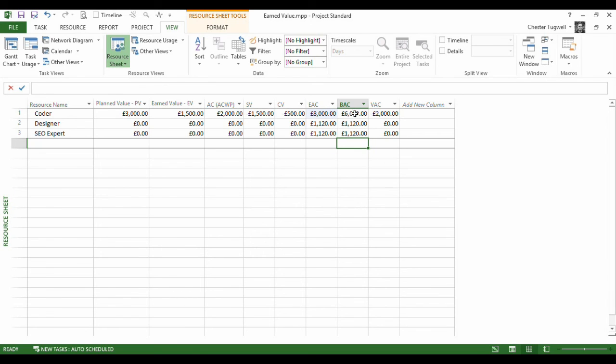Estimated at completion. Budget at completion is £6,000. That's what the task will cost at the end when the task is completed. But this has looked at my overspend so far, imagined that there will be a constant overspend at that rate, and calculated that my overspend is £8,000.